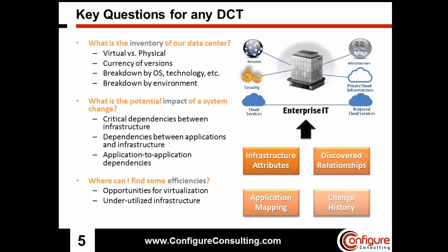Similarly, it's imperative to have a hold on the critical dependencies between elements of the infrastructure. And that on the day that I physically relocate, impact on these 20 servers then have been mapped up to these 5 business services, and let's plan around that. Sometimes organizations take a best guess at this level of impact, relying on tribal knowledge, internal records, or even anecdotal examples of how things have failed or been slowed down in the past.